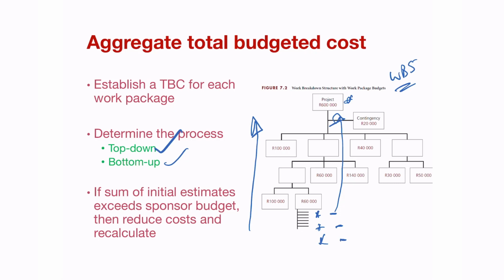The alternative is that you have a total project cost, and you allocate for each one of the different elements. You allocate a project or sub-project cost to each group of activities. So you can tell them that this is your budget, you have to deliver this particular set of activities or this particular artifact or this particular outcome, and manage it within that particular budget.